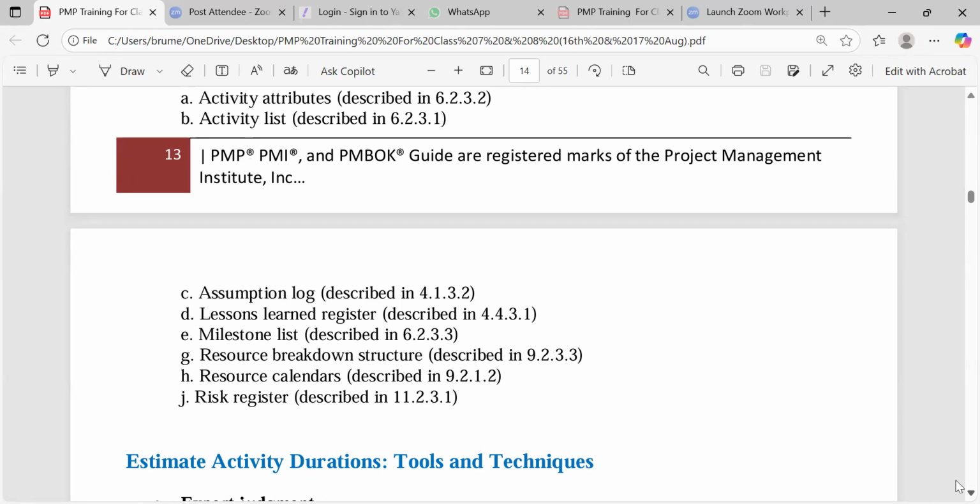Yes. So if you are to go and hire or recruit a civil engineer, it must be done several weeks or days before that day. That day they should be on site. So the resource calendar can guide you in doing that. So that's why we need it. Then the risk register. All the identified risks are in the risk register.